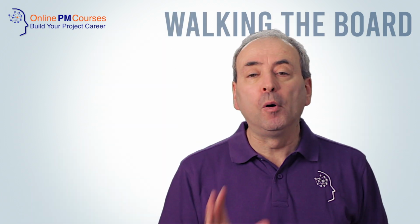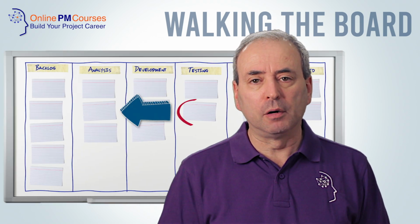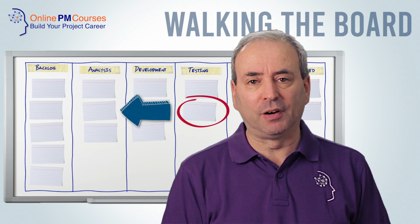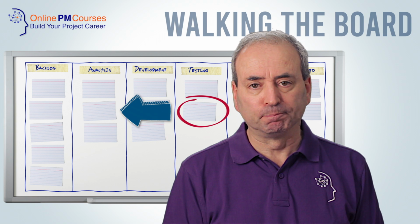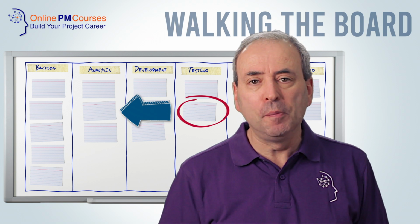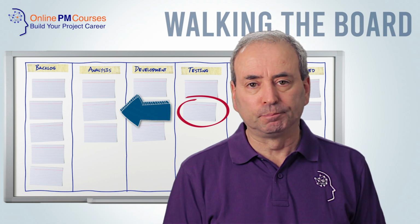The walking the board approach starts with a Kanban board. It starts with work in progress and moves from the right to the left. For each task, the facilitator will identify who owns it and ask how progress is going. In particular, they'll focus on the blockers or impediments to making progress and then open up the discussion about the support that the group can give to unblock progress.